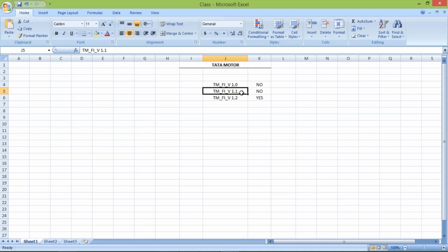Once again we make the changes in our document, and that document is the blueprint document. We made the changes and changed the version. The document name version got changed, and we sent it to the client as version 1.2. This is approved. Now we take the printout of this approved version and produce it before the client for signature, so that it will be considered as the final version.